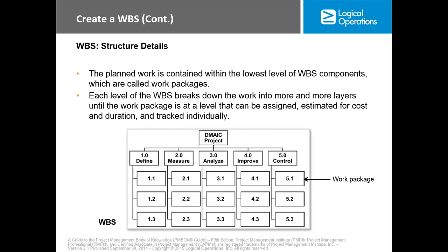Now, this is the structure of the WBS. We said that the planned work is contained within the lowest level of the WBS component, which is called the work package.